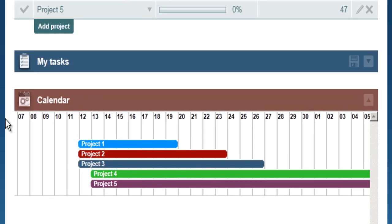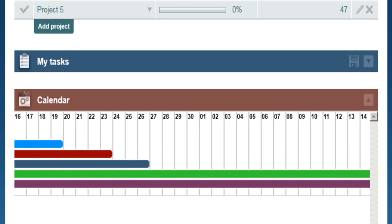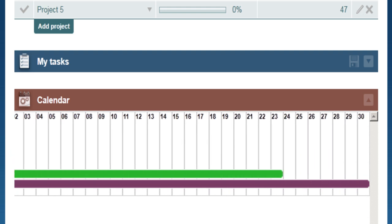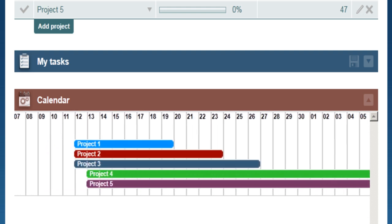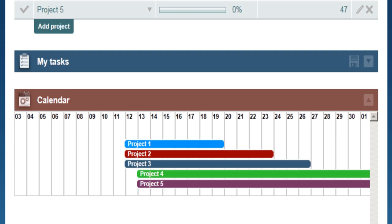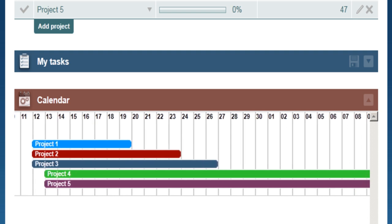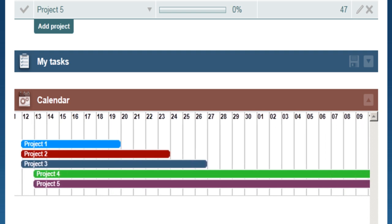It replaces the calendar view with a Gantt timeline of your projects, which means that there is a colored bar drawn for each day of the project. It enables you to quickly check how many projects are going on at any given time and how they overlap, allowing for more efficient capacity management.